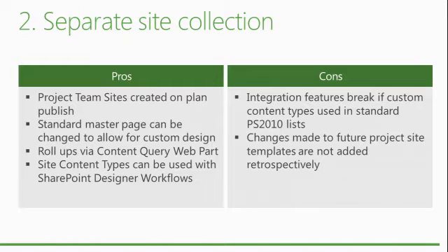roll-ups of that data. So one of the biggest things of having things siloed, and they're all list content types, of course, is that you can't roll these things up. So for my A5X chip, what are my main risks across all the projects? As a program manager, I want to see that kind of thing, and I don't want to see 3 separate reports that actually report 90% of the same data, but this report over here has 10%, which is really important to them, but means nothing over here. I'm not comparing apples with apples anymore. This allows you to go down that approach.